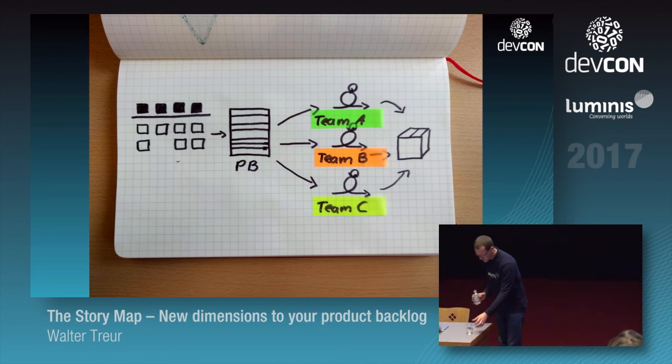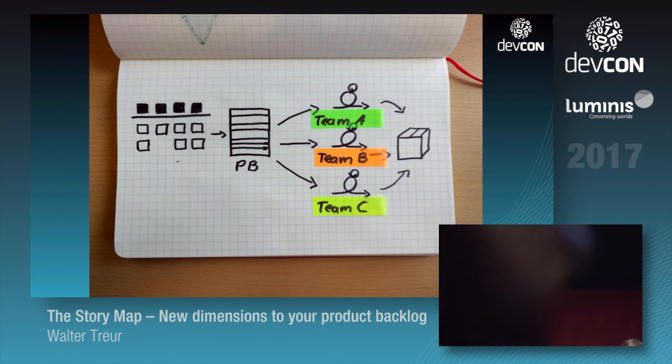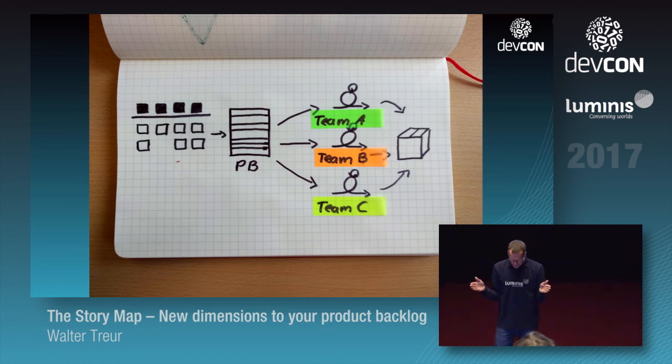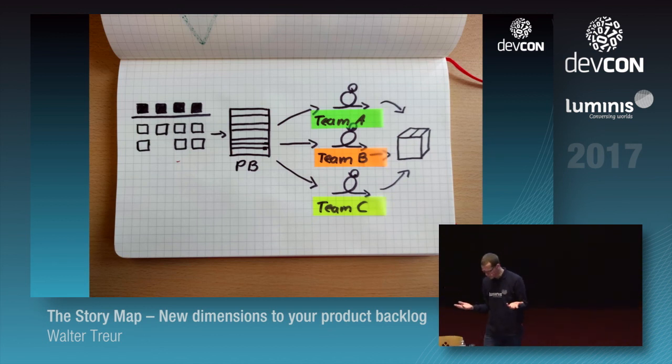No matter what type of strategy you use to divide the work, you want to isolate your teams a bit. You want to limit dependencies between teams. For example, if you're developing a new feature, but you have to wait for another feature being done by another team to be delivered first, you have a dependency which is going to limit your speed of development. It's going to be an impediment.